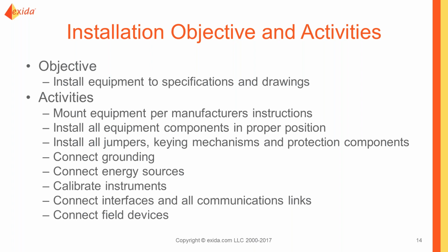The concepts and techniques we're talking about, we'll see kind of build through that, FSA 1 and FSA 2. Then I mentioned there were 5 points. So FSA 4 is a periodic review for a modification. Periodic review basically on time if nothing's changing, and or if a modification is made. And FSA 5 would be before a safety system is taken out of service.